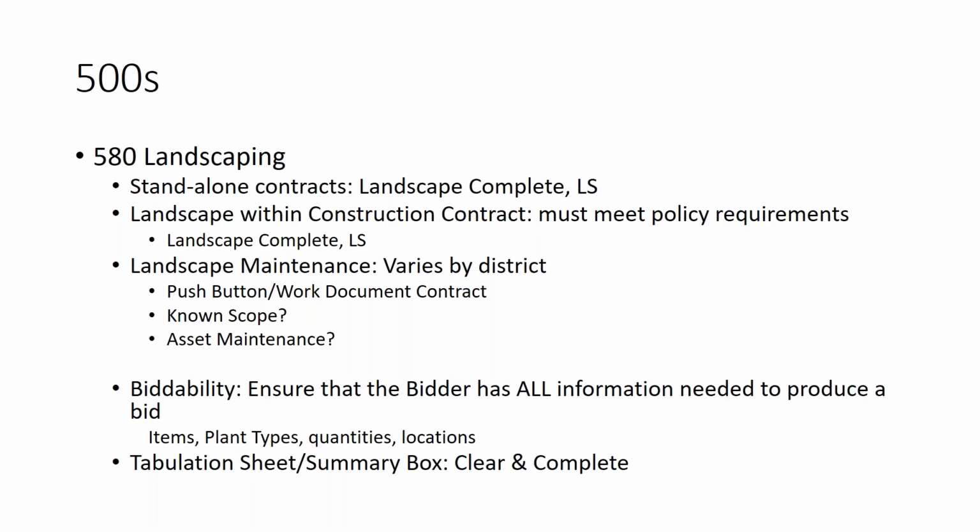In all cases, we want to ensure that the bidder has all information that's needed to produce a bid. So we need to ensure that they have the appropriate pay items, the types of plants, including their scientific names. They need to know the quantities and the locations.